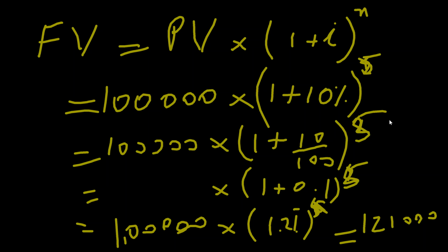In projects, in cost benefit analysis, what we are doing, we are doing all of this in reverse. What we are trying to do is ascertain the present value of how our business is going to behave in future. So we create some cash flows that this much money will come after 1 year, this much money will come after 2 years, and then you must be able to calculate the present value for each amount. The present value of the first year, the present value of the second year, the present value of the third year, and ultimately you can sum it up just like we did net profit, but this time when the present values are added, that would give me the net present value.